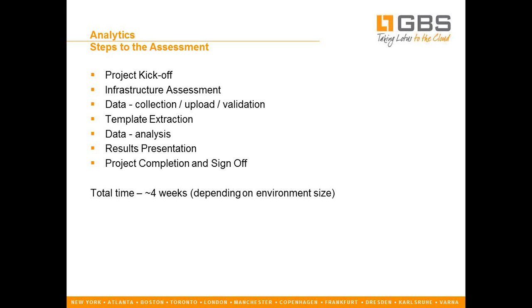We will present all of that information to you, at which point we can get a project completion and sign-off to move forward with what I want to call a whitelist of applications that we have targeted for transformation using Transformer. Generally speaking, this is a process that can probably take four weeks, give or take a bit, depending on the environment size.